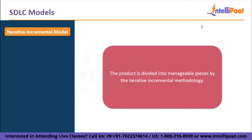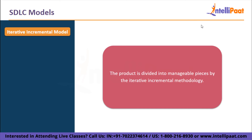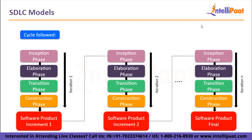Next, we will talk about the iterative incremental model. The product is divided into manageable pieces. A feature is chosen and put into practice during each iteration. Phases such as requirement, analysis, design, coding, and testing are completed throughout each iteration. After each iteration is finished, a product is confirmed and sent to the client for review and feedback. Customer feedback is incorporated in the following iteration. As a result, the product gains features as iterations progress, and the final build has all of the product's features.